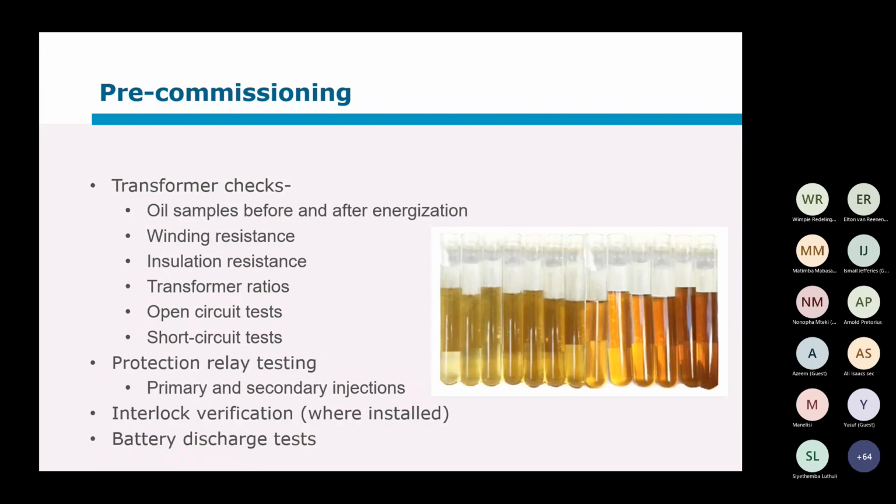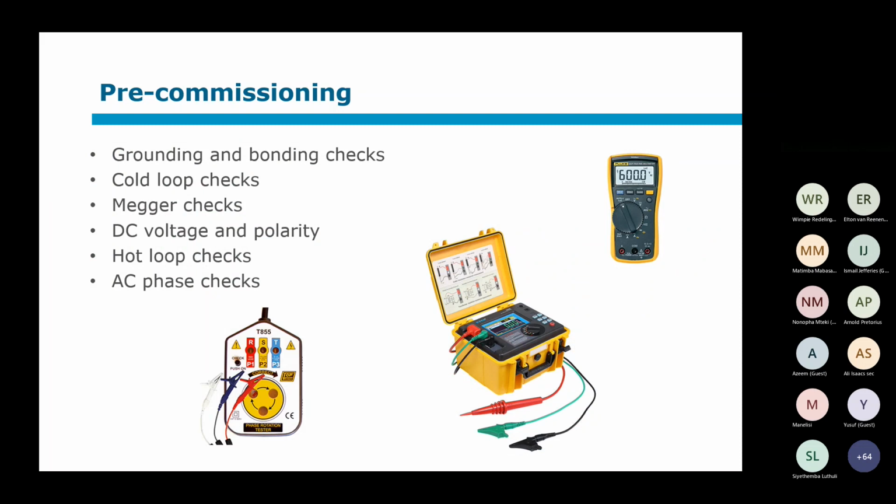Yeah, Gerard, if I can maybe just add. For the type of test the utility or distributor needs to do, it would be linked to standard tests that you would do in the field. So utilities will not be involved, for example, to check the insulation resistance or the earth continuity on a solar PV plant. That's something that they need to do, and they need to have that equipment. So no specific or different specialized equipment is needed from a utility perspective. In my view, it might be that the guys in the field experience it differently, that they needed to start testing and measuring DC leakages or harmonics or whatever, but that's where your power quality measurement would kick in. So that might be a different type of metering that's necessary, but it's more for constant monitoring purposes than a once-off commissioning test. Gerard, you can maybe just confirm if that's the case.